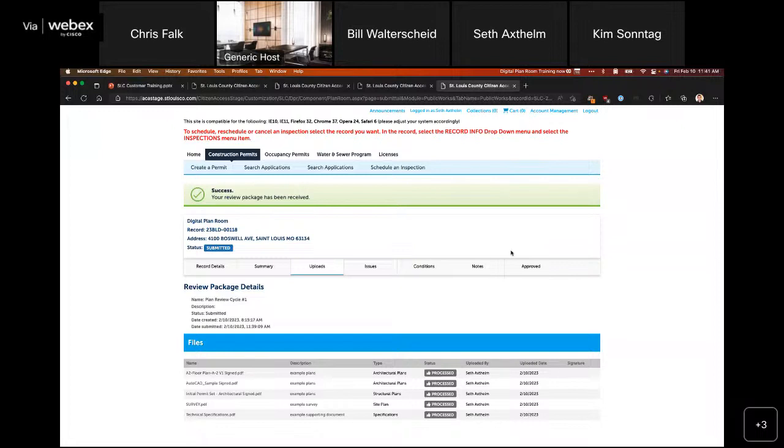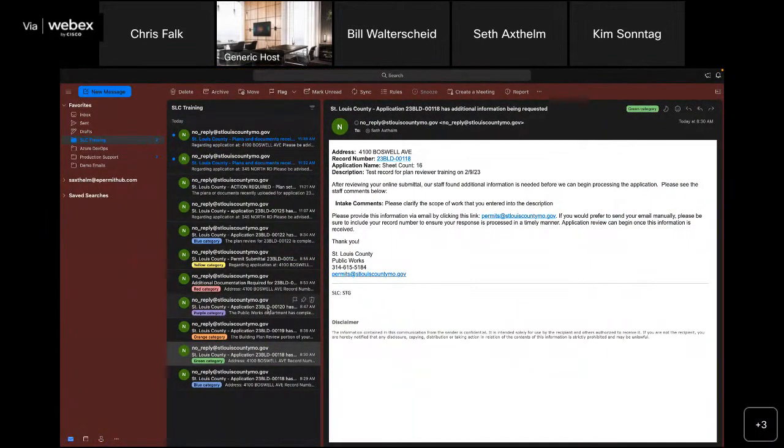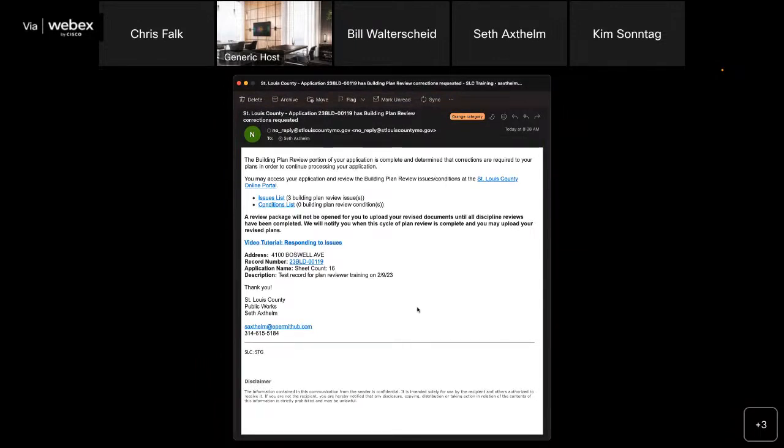And as each individual reviewer completes their review, if they have happened to find any issues that need resolution on your submittal, you will receive an email notification as each reviewer completes to let you know that there happens to be something that you can start taking a look at to prepare a subsequent resubmittal. So let's take a look at what that email looks like.